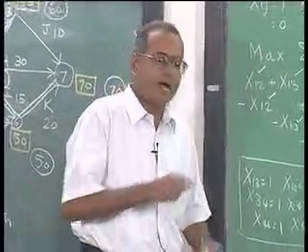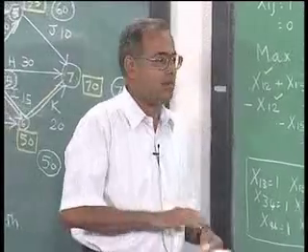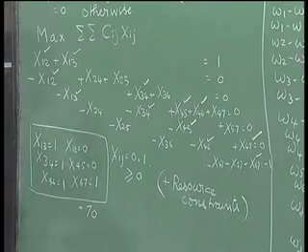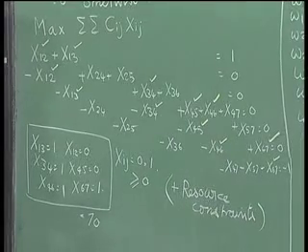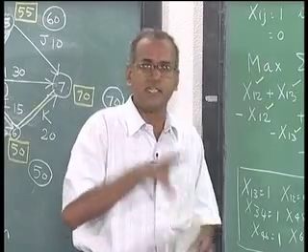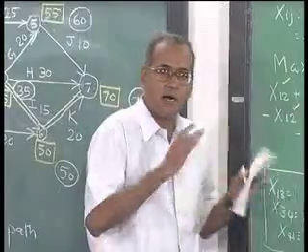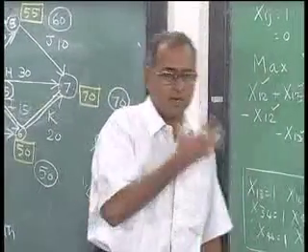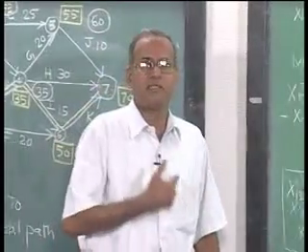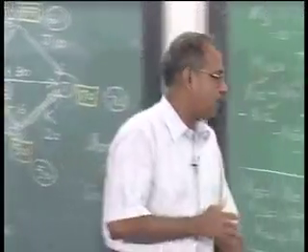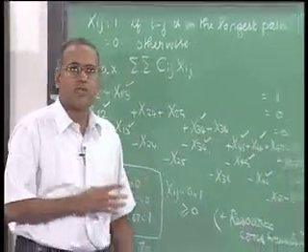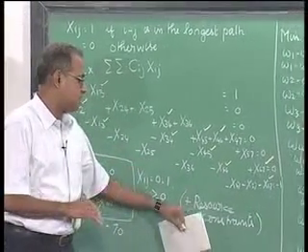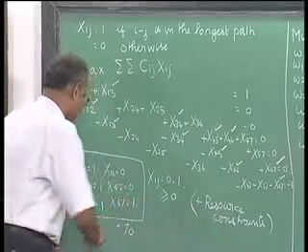The moment we add the resource constraints, the problem will lose its unimodular structure, and it cannot be solved as a linear programming problem. The problem will become an integer programming problem. It becomes a very hard problem, and it becomes an application of integer programming, a topic that we have covered in this lecture series. So, there are popular branch and bound algorithms as well as heuristic algorithms to solve the hard problem, which is the resource constrained project scheduling problem.